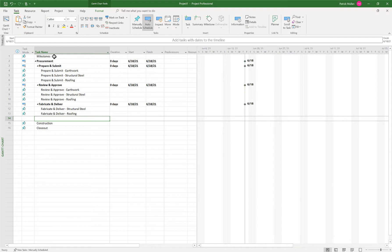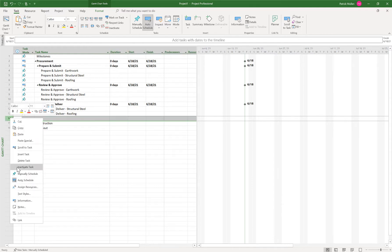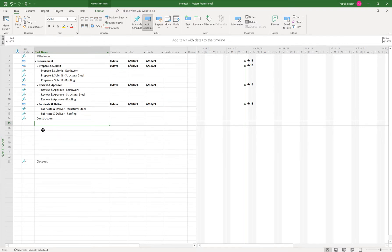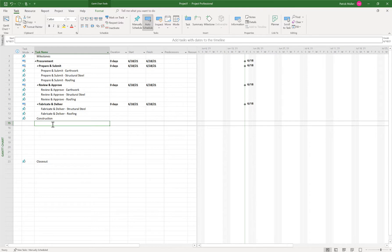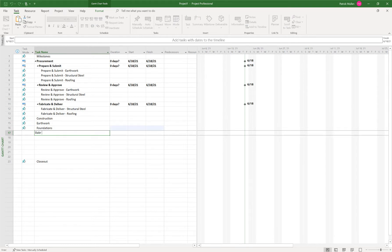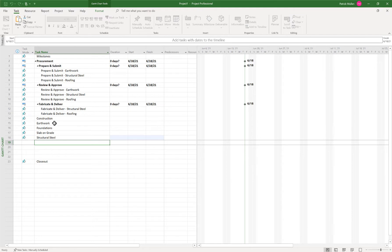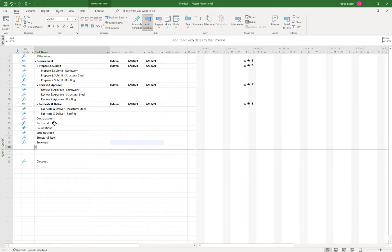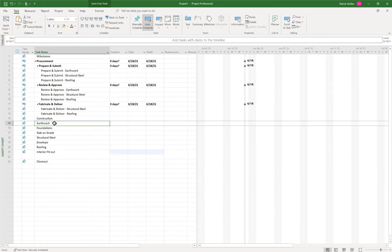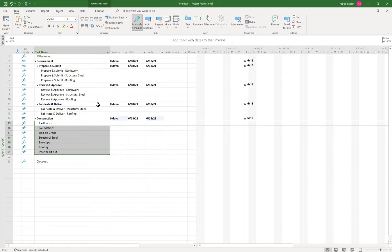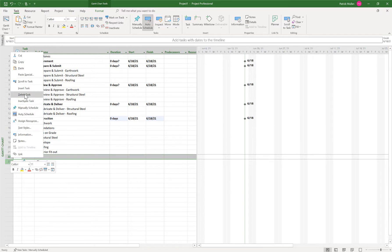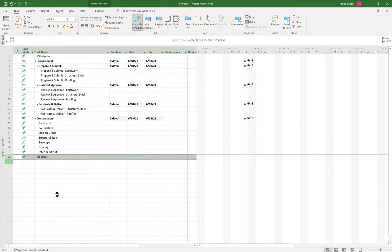So let's create some construction tasks. I can delete this row because I don't need that. I just like pressing insert a bunch of times to give me some space underneath construction here. And let's just do a couple tasks here. We'll do earthwork, foundations, slab on grade, structural steel, envelope, roofing, and interior fit-out. And I want those to be children underneath construction. So let's go ahead and indent those.